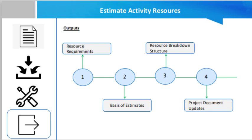Project document updates include the assumption log — the assumption log is updated with assumptions regarding the types and quantities of resources required. Additionally, any resource constraints are entered, including collective bargaining agreements, continuous hours of operations, compliance leaves, etc. The lessons learned register can be updated with techniques that were efficient and effective in developing resource estimates, and information on those techniques that were not efficient or effective.